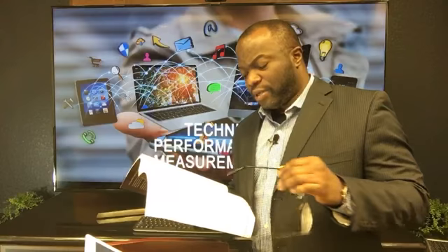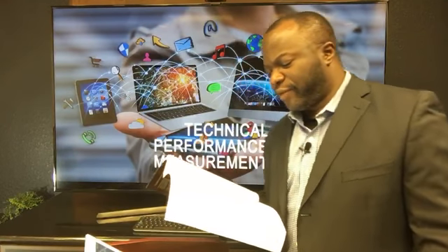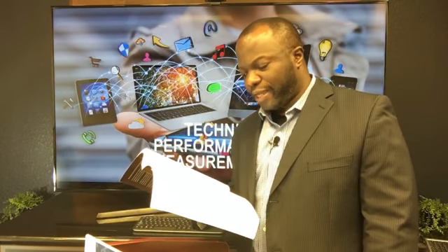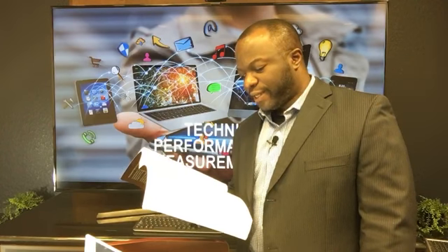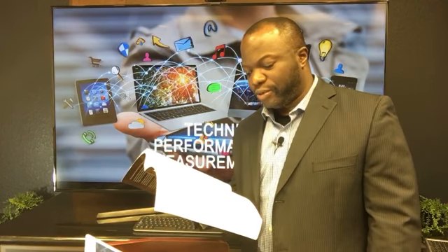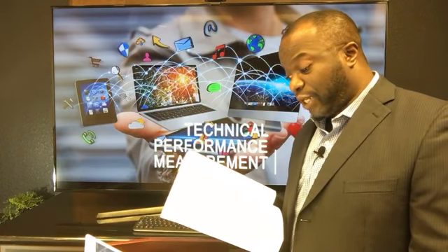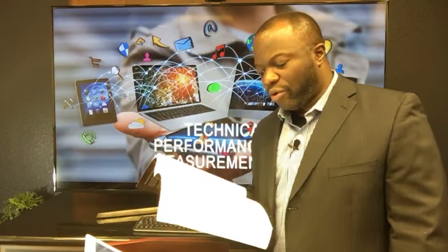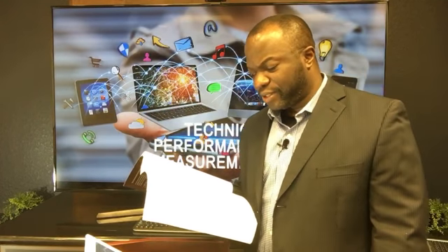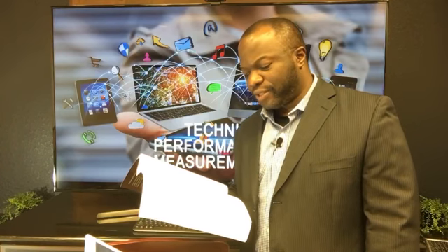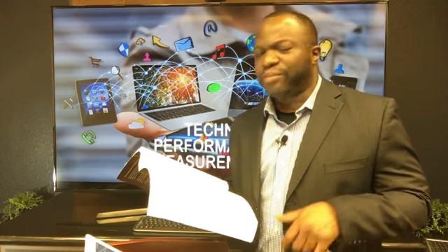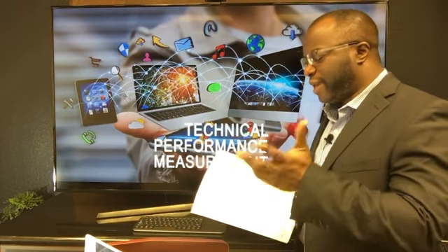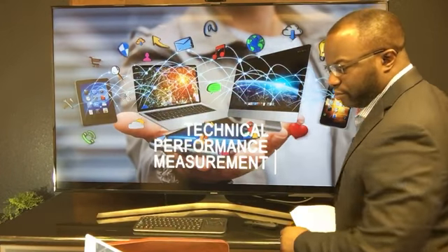What does it mean? It then goes further to say it requires the definition of objective, quantifiable measures of technical performance, which can be used to compare actual results against targets. Such technical performance measures may include weight, transaction times, number of delivered defects, storage capacity, etc. Deviations such as demonstrating more or less functionality than planned at a milestone can help to forecast the degree of success in achieving the project scope. So the bottom line is, where did we say we would be technically at this point? Are we there? No, we're not there. Then we could be in trouble, that type of thing. All right.